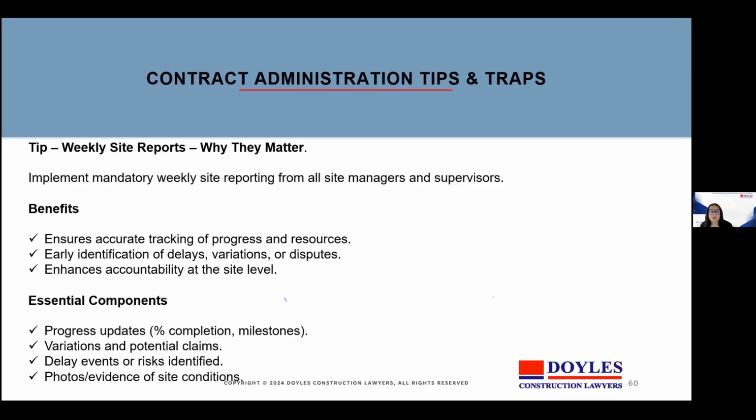So tip, why site reports matter. These reports provide early warning and provide strong evidence. So implementing them as mandatory reporting for all site managers and supervisors ensures accurate tracking of progress and resources, the identification of delays and variations or disputes early, and enhances accountability at the site level.